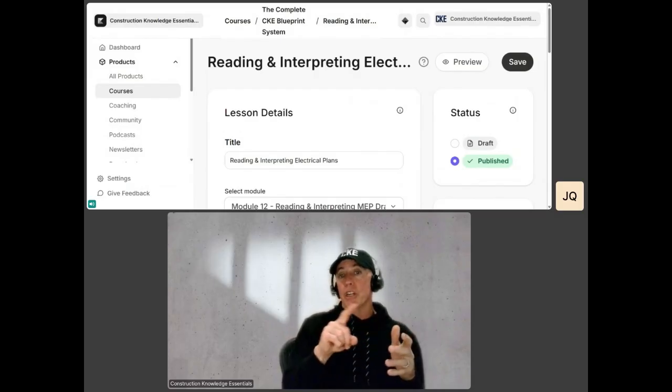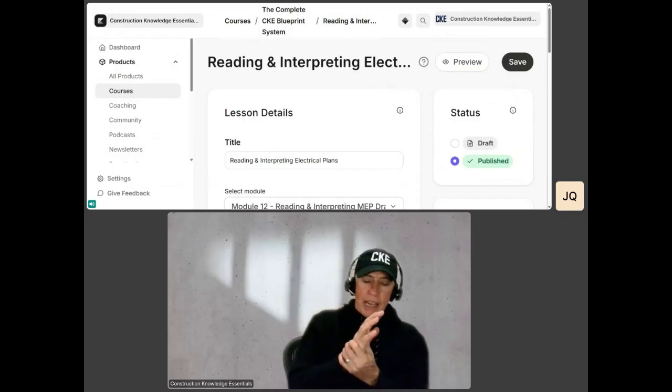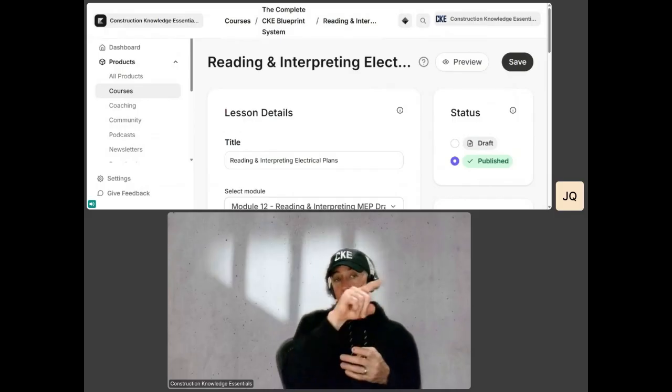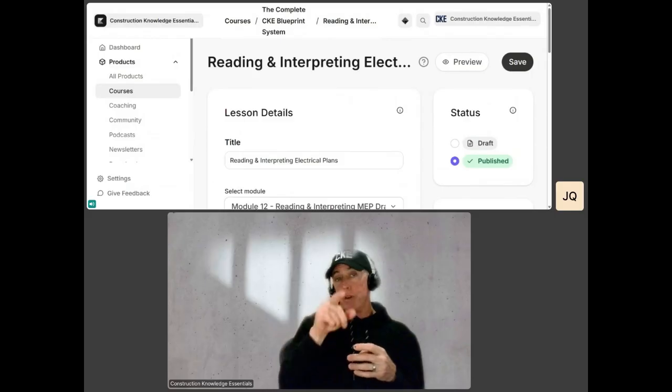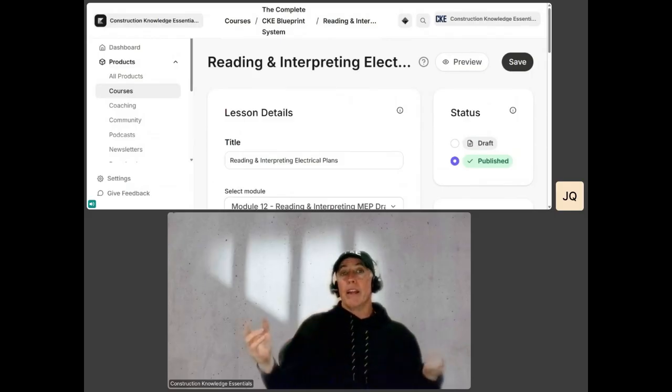Then I call the electrician. I'll put his in for 2 days. I'll call him and say, hey, what do you think? He usually says, yeah, a day or two. So let me just do that. So now you've got a schedule of 2 days for this, 2 days for that. Now you've got your rough-in.